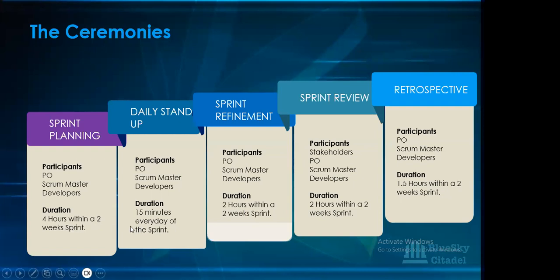Definitely with this now, if you're having a 4 week sprint, for example, you should have refinement for 4 hours, and retrospective for 3 hours. But we are using a 2 week sprint as the benchmark, right? So please let me repeat myself. Refinement is actually that ceremony I said is the fourth ceremony that is not really part of the ceremonies. However, we use it because it's very important, and I'll tell you the reason why as we go on.